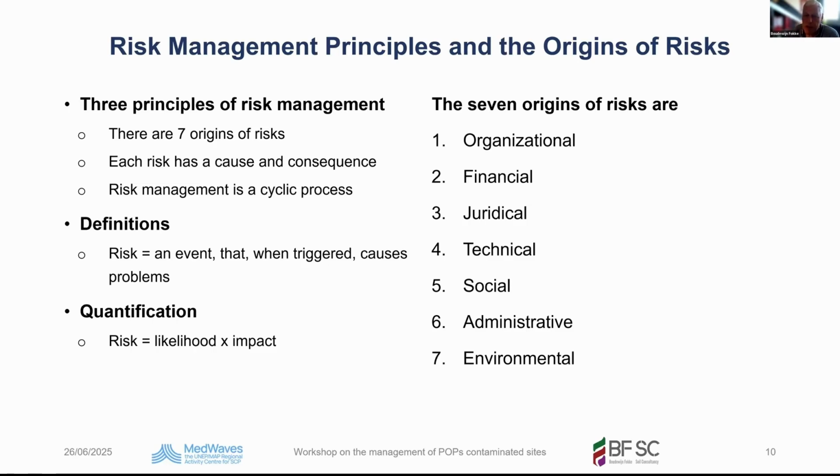My response to this is that if you have a remediation process, it's often not possible to take away all the risk because of technical limitations or financial limitations. So you take away as much of the risk as possible, and the remaining risk should be maintained and monitored in the last phase. So implementation of the remediation process is not a waste of time and money, but it reduces the risks. That's my response.